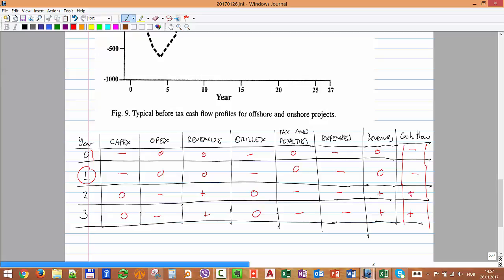We are counting from where we took the decision, so this is where I took decision gate 0, I think. Was it right? That we decided on the identification of the business case and we decided to go for it. So that's why we are excluding exploration here. All of that happened before DG0.